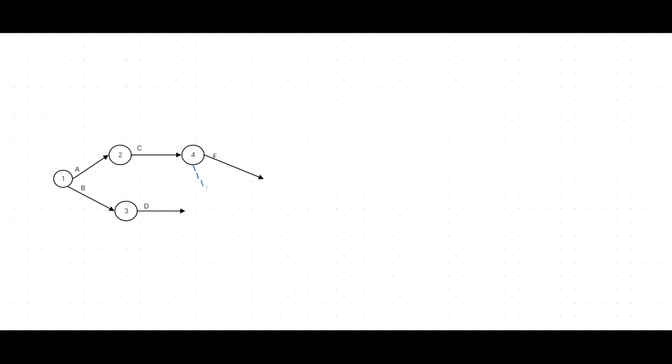The dotted line arrow represents what? Complete C. We call it the dummy. It represents what? Complete C. Then you can take the D. Then we can complete CD both after the fifth event.